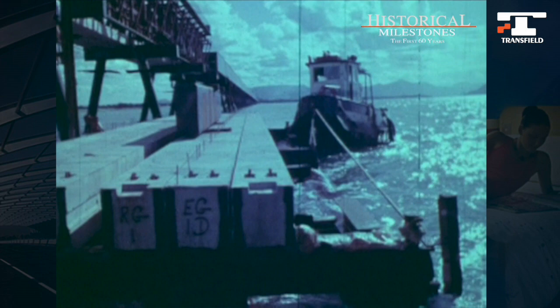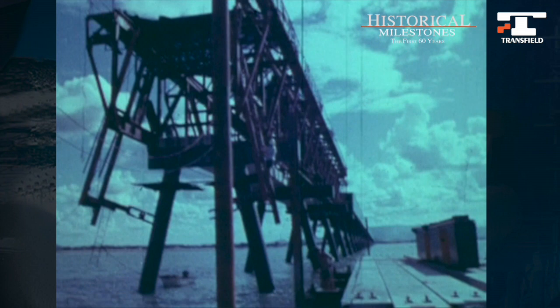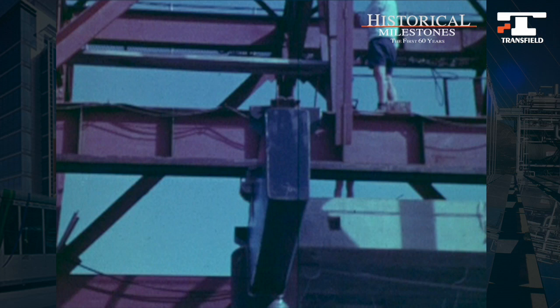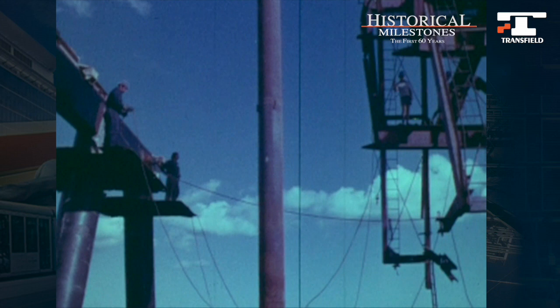Another design innovation of the project was the use of two travelling construction bridges, which could cantilever over the jetty. On top was a gantry carrying the 90-ton Lima crane. The whole bridge was moved fore and aft by a system of wire ropes and pulleys, with the Lima crane providing the winching capability. In front was a pair of pinned pile gates.